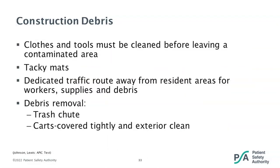Two other key points for construction and renovation projects are negative pressure and construction debris. If negative pressure is required, it's important to ensure there is negative pressure from the construction zone relative to the surrounding areas — this will prevent the release of airborne infectious agents from the work area into the clean area. This slide shows a diagram of the proper negative pressure flow: you want air to flow from the clean area into the construction area, and then ideally outdoors. If the air cannot be exhausted outdoors, or it's exhausted outdoors near an intake or a common pedestrian traffic area, it should first pass through a HEPA filter. Regarding construction debris — all clothes and tools need to be cleaned before leaving a contaminated area, tacky mats should be used when exiting the site, there should be a dedicated traffic route away from resident areas, and debris should be removed in tightly covered carts whose exteriors are cleaned.